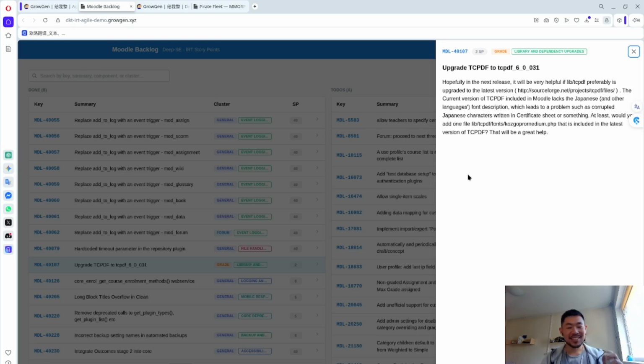So why is it very important? For example, if one team can finish 25 points in a week, the next week the team will probably also finish 25 story points. So the project manager can guess how much of the feature will be implemented during this week, the following week, and the next week. But consider this problem.